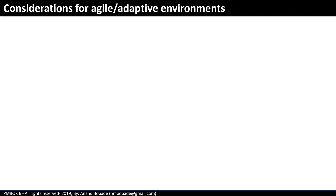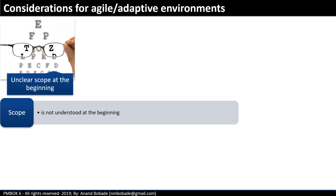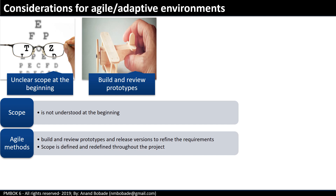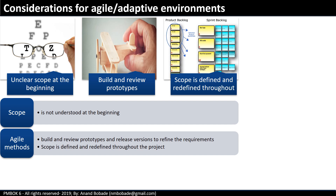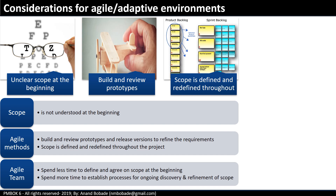What are the considerations for agile and adaptive environments? Agile projects will have an unclear scope at the beginning — sometimes the business doesn't know the product requirements. They might say, 'we want to develop the best TV in the market,' but the project team may need to build a prototype and develop product understanding through that process. Agile sprints are executed to refine the product until it meets customer requirements, and scope is defined and redefined throughout the project lifecycle. Agile teams spend less time defining and agreeing on scope at the beginning; however, they spend much more time on ongoing discovery and refinement as part of each sprint iteration.